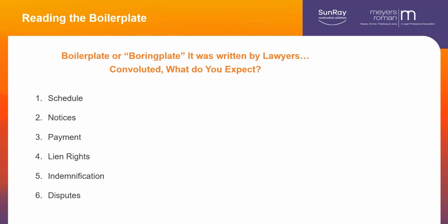Nuh-uh. Another technical legal term. You have to read down the whole payment paragraph because somewhere in the middle, 3 sentences down, it's going to say it's a condition precedent that we are paid before we have the obligation to pay you. Now you have a pay if paid clause, despite it looking like a pay when paid clause to begin with.